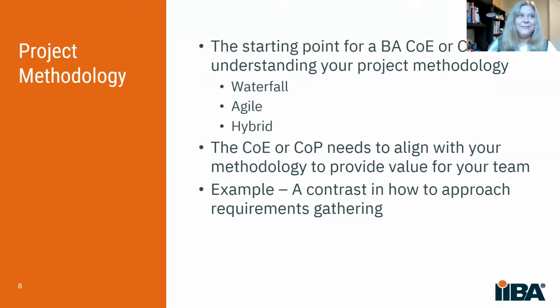In contrast, Agile is delivering the minimum viable product, or the MVP, in a 2-week increment. And I think of a Scrum framework where there's a team and there's a backlog that the product owner has created. And you go through a spin, in that 2 weeks, of sprint planning to pull the stories in, daily stand-ups or Scrum to see where people are at, what they're working on, any blockers they might have, as well as backlog grooming in the middle of that 2-week sprint to think about what we might bring in the next time. And then a sprint review with the business to assess if we got it right, and then a retro to find out how we can make things better the next time where we missed the mark, with the team providing inputs.